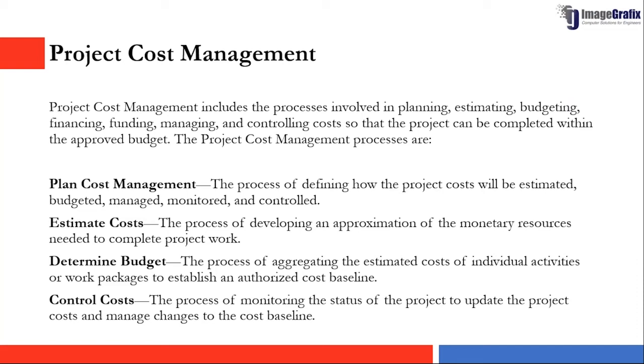Coming to project cost management, first will be our plan cost management. So first each organization needs to identify how they will determine their cost, how they will be estimating the cost, what tools they will be using, how they will be managing their budgets, right? How they will be monitoring these budgets, capturing the actuals, and controlling the changes that will be happening across the project. Then your estimate costs.